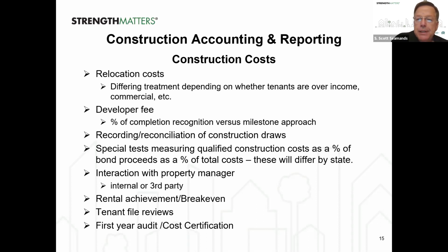I've seen situations where the final draw on the bond didn't occur until the next year, and that was unfortunate because then it jeopardized passing the 50% test, because you don't get to include next year's bond borrowings. You have to look at this year's bond borrowings. So that's a very important test to make sure you're going to pass when it gets close to December 31st.